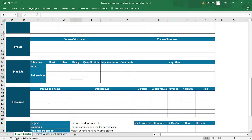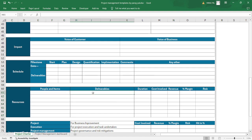For resources, if there are hundreds of resources, you can add an appendix — 'Refer Appendix A' — and attach it to the project charter. In that appendix you define the importance of each resource, the duration required in hours or months, their cost involvement, the revenue obtained, margin, and the risk if a principal engineer or team leader leaves the business.